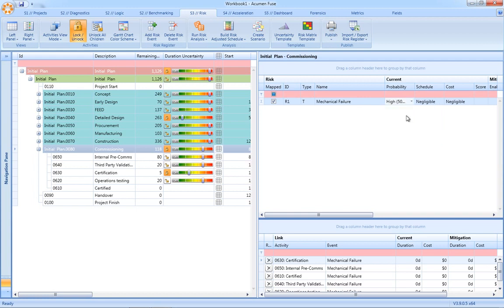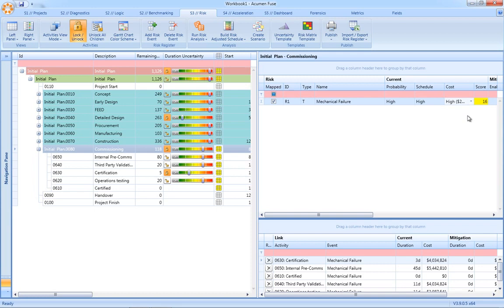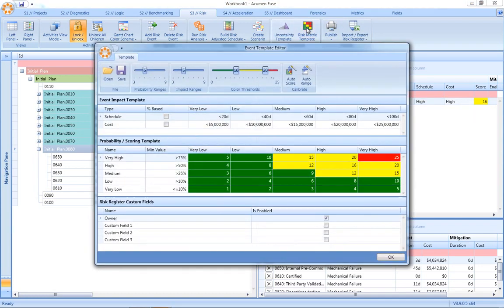Each risk then carries a probability, a schedule impact, as well as a cost impact. And again, behind the scenes, the scoring mechanism for our risk register is defined in what we call a risk matrix template.